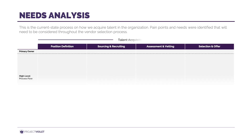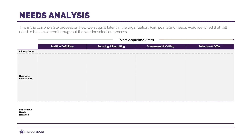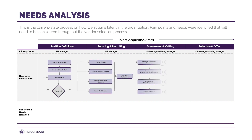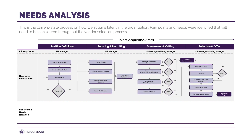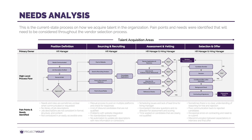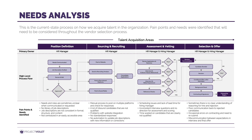Here's a sample of what the needs analysis could look like, using a specific example for talent acquisition. The high-level areas of the talent acquisition process are shown across the top with the primary owner and process flow outlined below. Get the right stakeholders in a room and whiteboard the whole process. This will help engage your team and get more perspectives on identifying pain points and needs for each area.